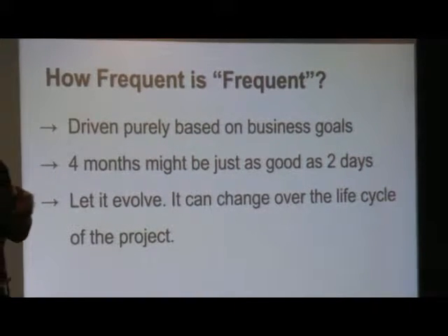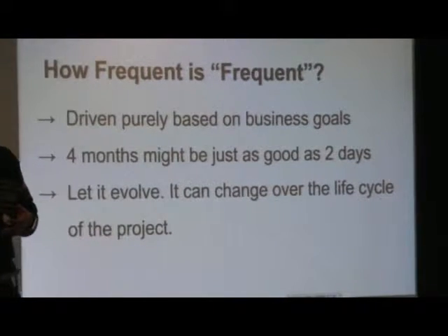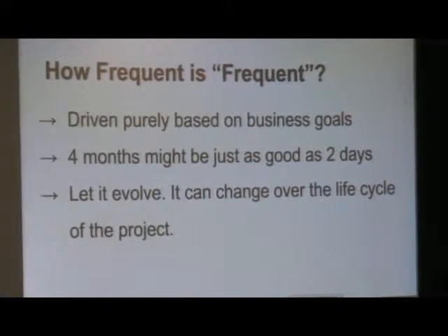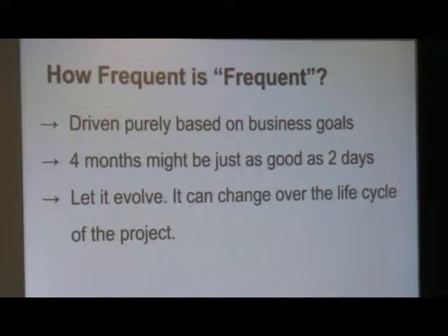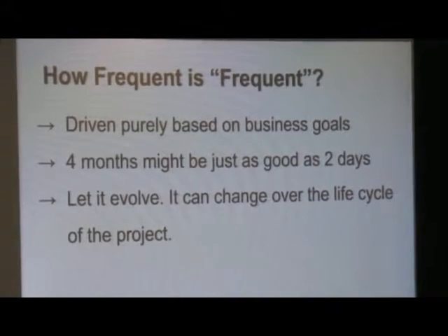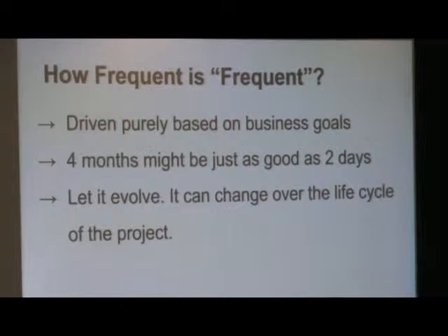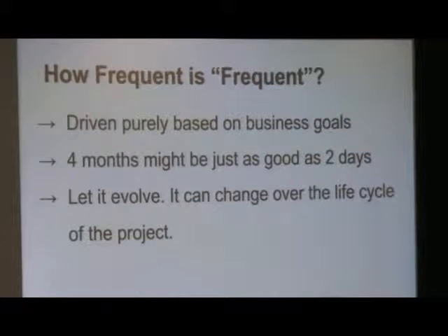That's probably the important lesson here. Then we had the conversation with the customer, like, do you really want us to quickly push? And then we realized that they were not really that particularly worried about it, right? But because we've been doing it, they already started seeing the benefit of quickly seeing those features. They were very happy with it. So now it's just gone. We don't even talk about weekly or bi-weekly or whatever it is. We just push it whenever we are done with something.